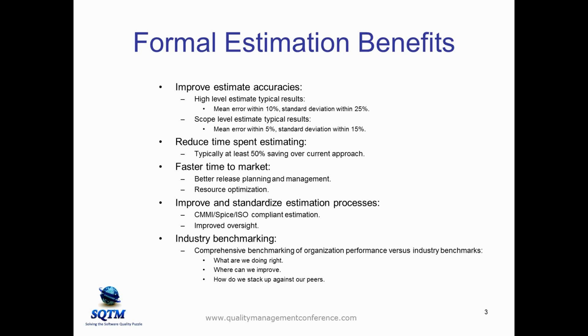The only measure that you have of size is the estimated person hours of effort. So you don't have any other universal size measure such as function points or source lines of code or UML points or story points or something like that. So by doing formalized estimation, by definition we're going to have some kind of a size measure. If we do it right, that size measure will have some benchmarking ability.